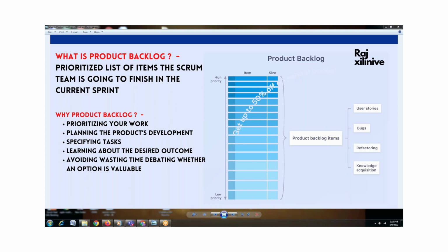So what we do now is, usually user stories will be divided into tasks. What is the task here? If you take a login page as the functionality, front page designing will be given to one person. Database designing will be given to others. Testing will be taken care of by others, and coding will be looked after by other people. So the same user story is divided into 4 different tasks: user interface design, testing, coding, as well as database design.